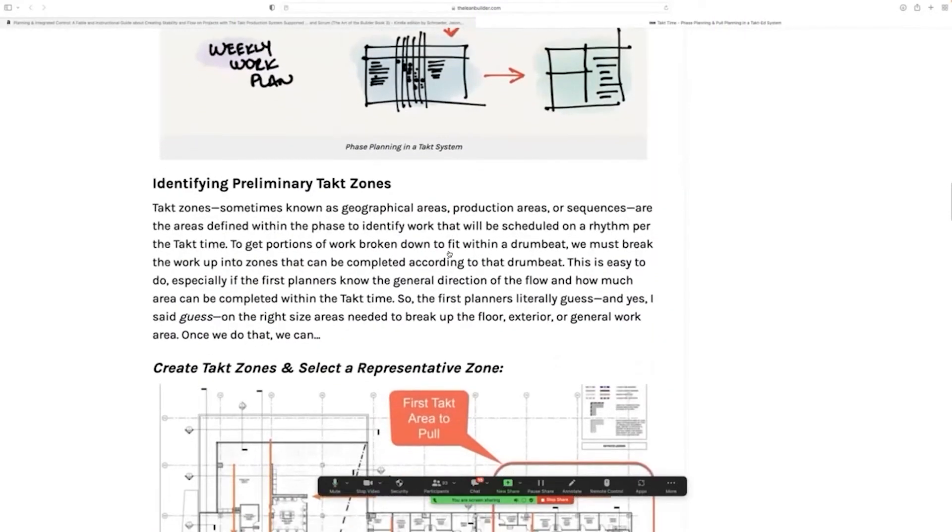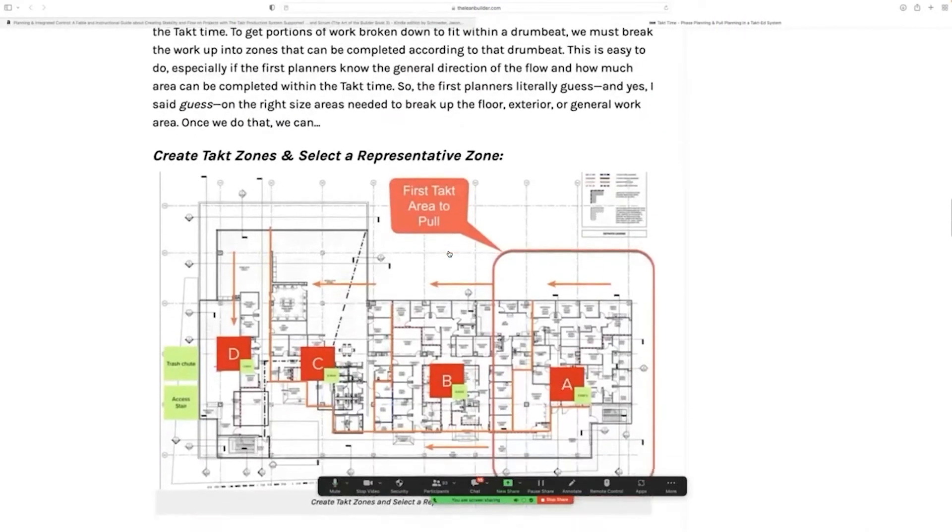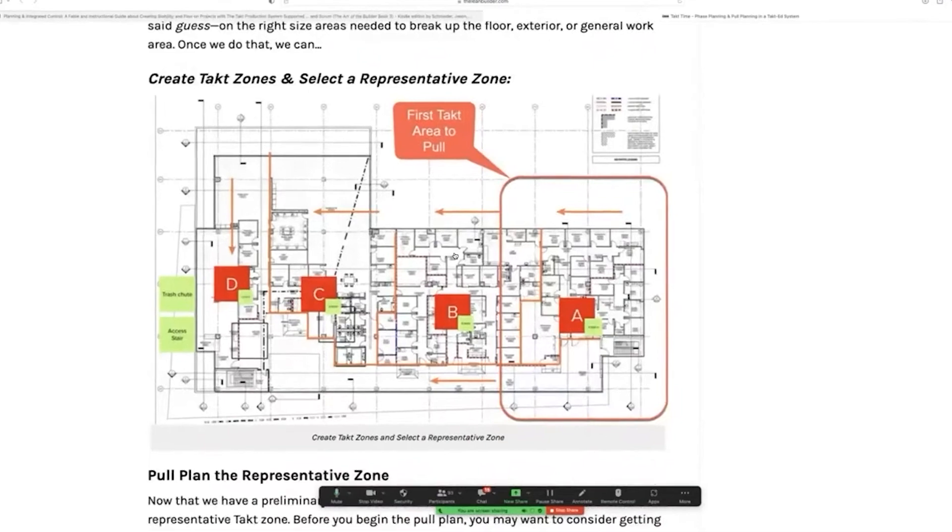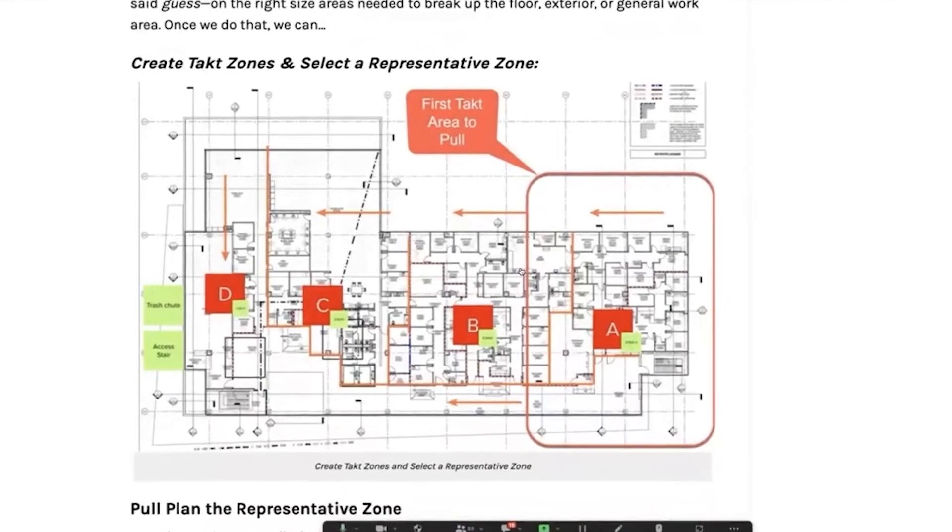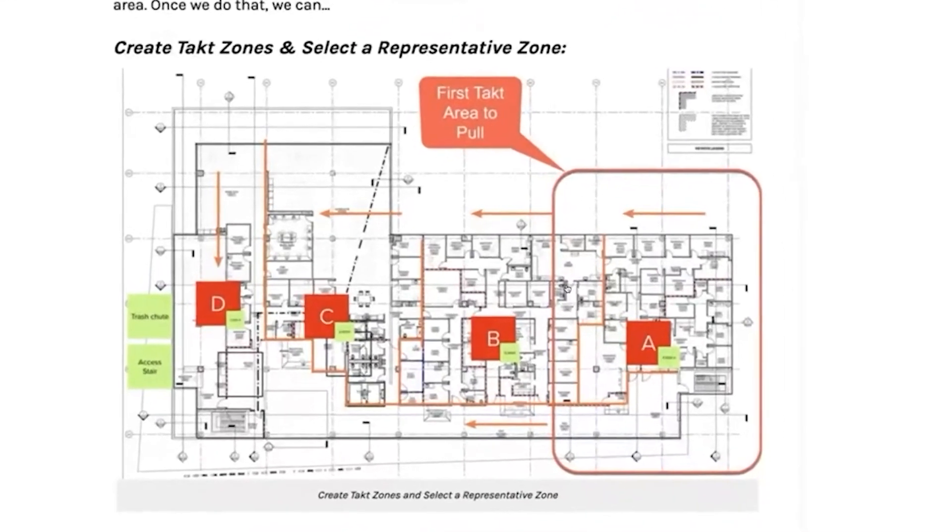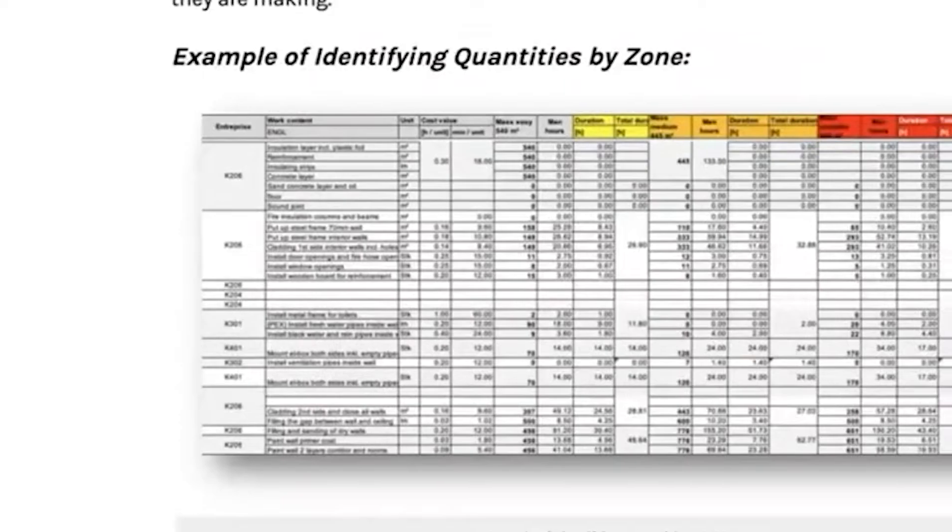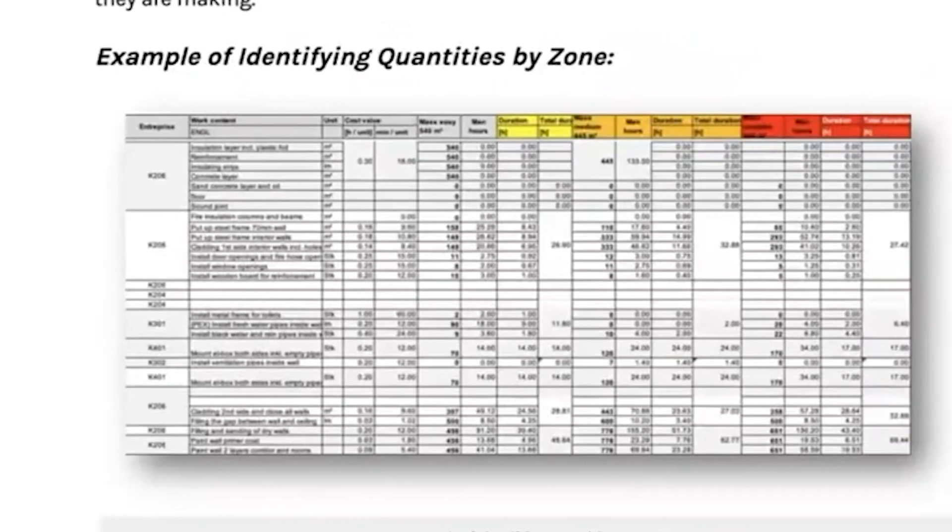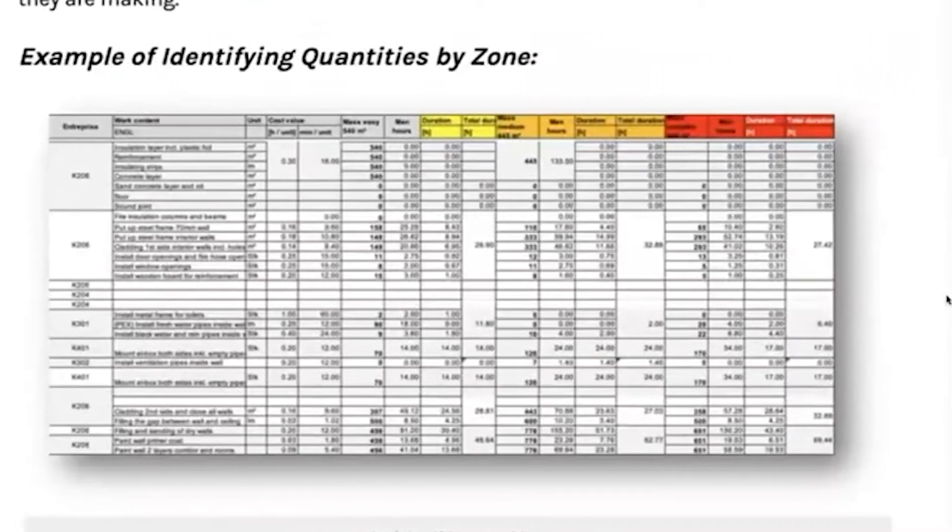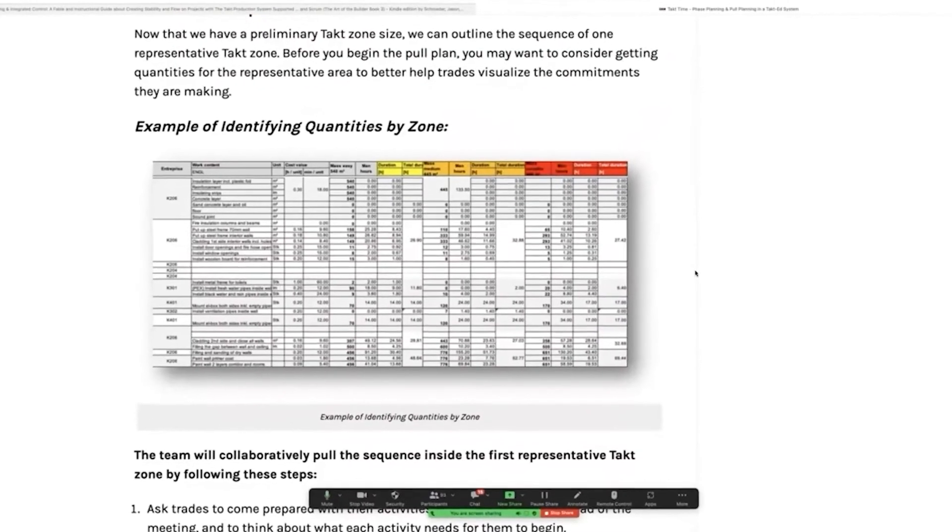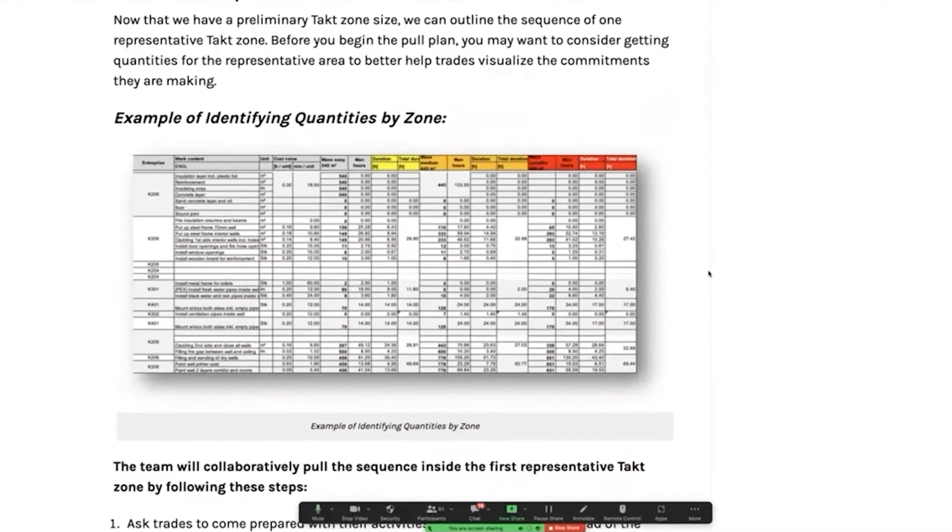Let me take you through that quickly. The first thing that you do is you identify your tact zones. After that, you get quantities by zone, if you have them. Most of the time, your estimators will have them.